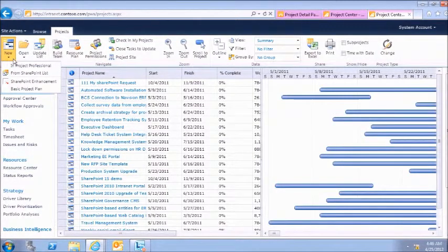When we want to start a project, and we're starting within Project Center, but we don't have to, we've essentially got 3 different ways of doing it. We can start within the project client and save it onto the project server. We can go to a task list on the SharePoint and then create some structure with that and then import it.